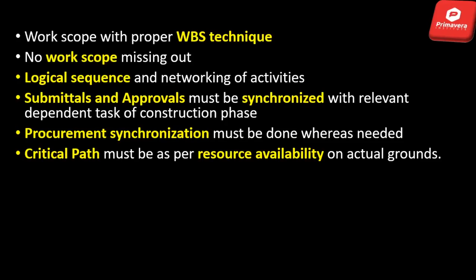How can it be realistic? Whatever resources your company has, you have to go for those resource productivities, and then drive the duration. It's not that you will just say you will complete that activity in 10 days. You must have that much resource capacity to complete that certain activity in 10 days. So that is a very important point while developing your project schedule in the planning phase.